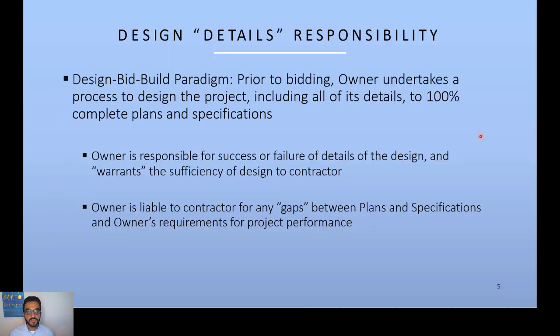So in design bid build, the design details responsibility falls on the owner. The owner has that responsibility to work really hard with the designer to finish 100% of the design, package it in a bid, ship it, and ask the contractors to bid it. The owner here is responsible for the success or failure of that design